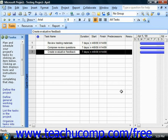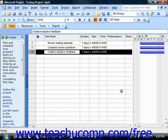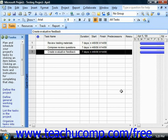You can use M for minutes, H for hours, D for days, W for weeks, and MO for months. So for example, using a standard work schedule for a task that starts on a Monday and has 5D as the duration, it will finish on the following Friday of that same week.